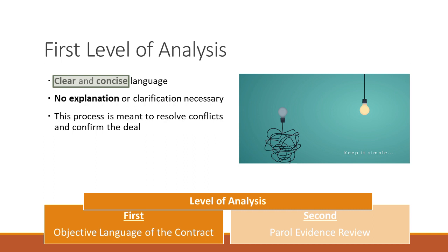But what may end up happening is that the contractor looks at the drawings, it isn't as clear, so they issue an RFI. That creates a request for information to clarify what the contract, which includes your drawings, really says. And at that instance, you, as the architect, will answer that RFI, and hopefully it doesn't go any further. It doesn't require a change order, it doesn't require more pricing to the project. But at that point in time, you are actually doing this first level of analysis.